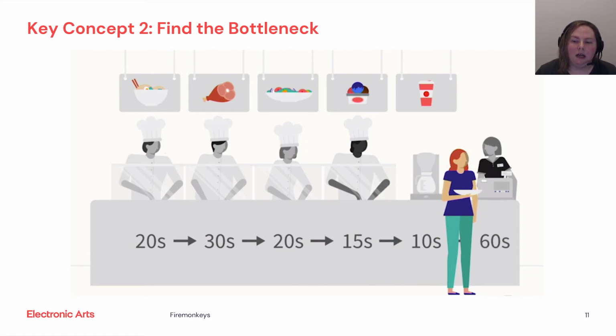Finally, we monitored our animation progress closely to determine if we were on target or if we needed to make any further adjustments, such as cutting scope. Without addressing that bottleneck, we would have delivered that project more than a month later than we did. It's hard to understate the importance of identifying and managing your bottlenecks.